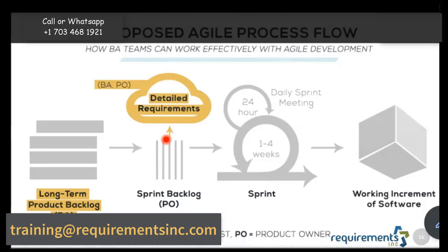And once you're a mature team, you know, okay, our output is 15 points. We know that right off the bat when planning the sprint. Now, is anyone out during the sprint? Usually we do 15. This time, since this person is out for 4 days, we'll just bump it down to 12 instead of 15. Make sense?